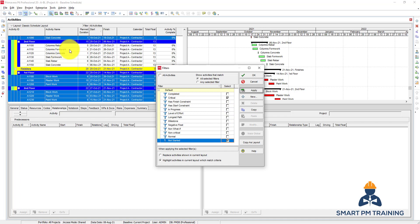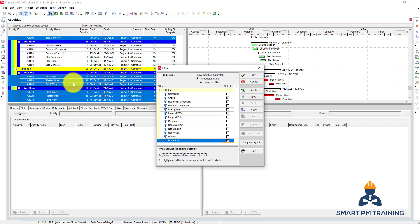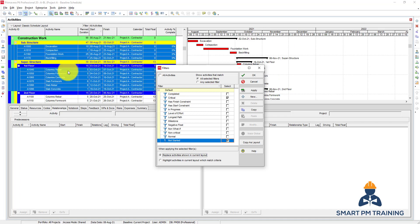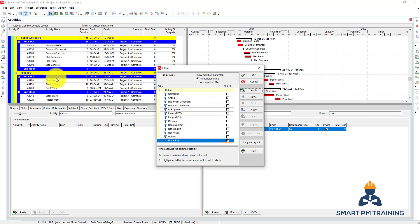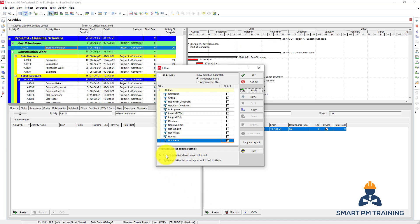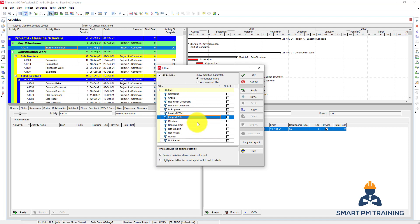These activities haven't started yet but they are not critical. Alternatively, you can choose Replace Activities, which means Primavera will hide the non-matching activities and only show the filtered ones. Click Apply and now only the filtered activities are visible. This is the most commonly used option — most practitioners use this — but it's good to know the highlight option as well. Now let's create a custom filter.